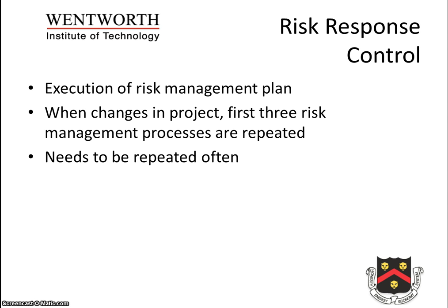Risk response control involves the execution of the developed risk management plan in response to the risk events during the course of the project. Whenever there are changes made to the project, the first three risk management processes, identification, quantification, and response, are repeated. It is a good practice to bear in mind that even the most comprehensive and thoughtfully structured analysis cannot point out all the risks and likelihood of occurrence correctly. This makes the project risk management processes an activity to be repeated often.